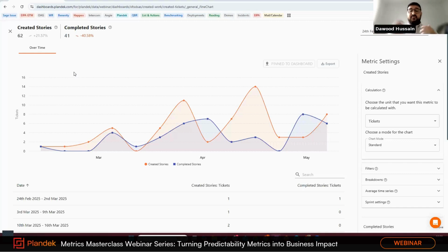So if we drill this down into specific issue types, we can identify whether there are certain bugs that are being created in these specific peaks as well. But on face value, this is very simple but very effective, especially for Kanban teams to understand, okay, are we actually getting through all the work that we've created over the past 12 weeks or any other given time period? And if we're not, that means the backlog is growing, and what do we need to do to try and rectify that as well?